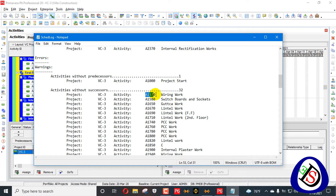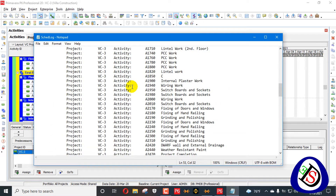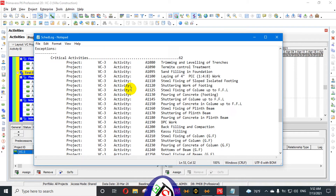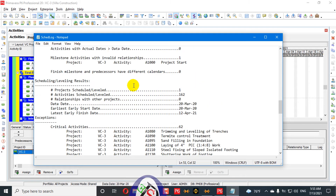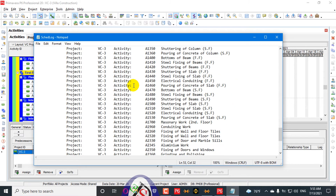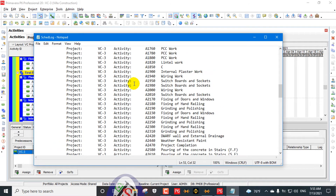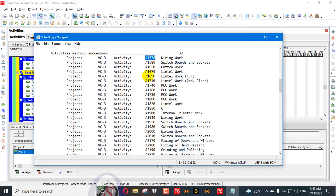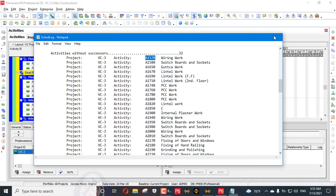You can find those from the activity IDs listed in the log. This log file will appear when you are using an older version than 19.12. This version is the latest 20.12. If you haven't installed it, you can see the video in my playlist about downloading and installing 20.12. So these 32 activities are dangling activities.